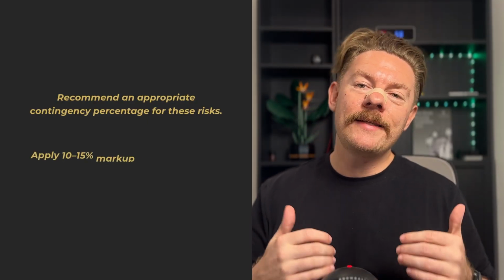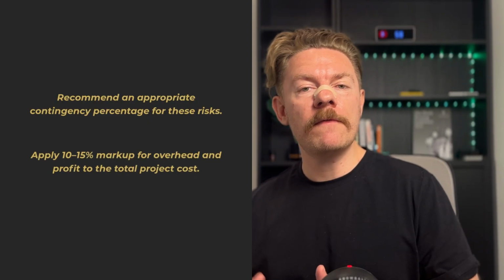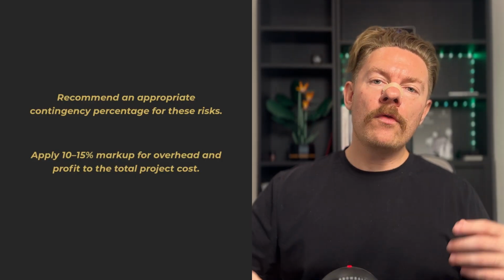Ask it to apply a 10 to 15% markup for overhead and profit on the total project costs. So not only will you have your entire cost estimate, but you'll also have your final value estimate as well. You can easily decide whether a project is worth pursuing or not.